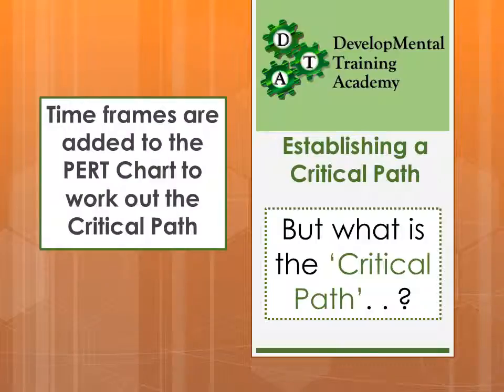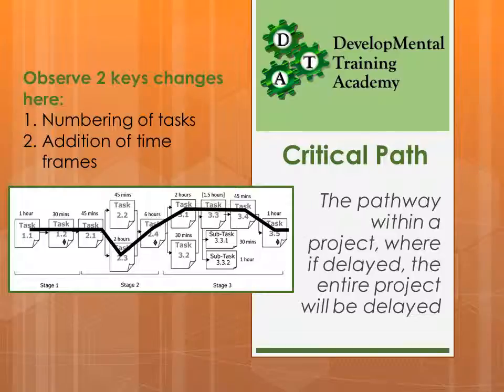The next thing is to establish what's called a critical path. This is where time frames are added to the PERT chart to work out the critical path — it's taking it to the next step. Many people get confused thinking that the critical path is the most important pathway on a project, but that's not actually the right definition. The critical path is the pathway within a project where, if delayed, the entire project will be delayed.